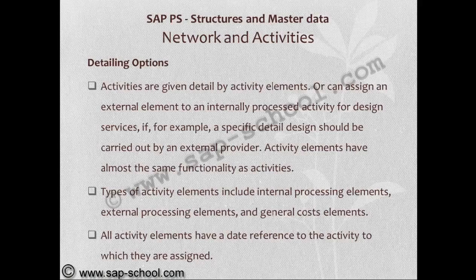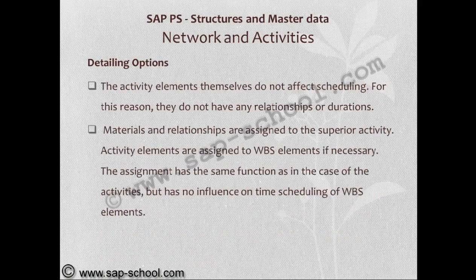All activity elements have a date reference to the activity to which they are assigned. The activity elements themselves do not affect scheduling. For this reason, they do not have any relationships or durations. Materials and relationships are assigned to the superior activity. Activity elements are assigned to WBS elements if necessary. The assignment has the same function as in the case of the activities, but has no influence on time scheduling of WBS elements.